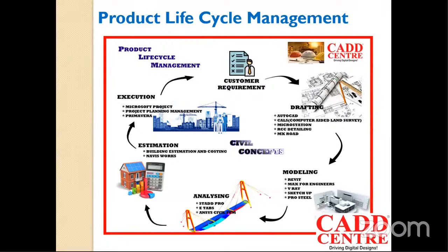Now the problem is in the profile of the duct. The plan fails and moves to the structural department. Again the plan fails in the duct profile and moves to the structural department. The structural engineers have to redesign something. Then it moves to the architectural department for approval, to check whether the aesthetics are okay or we have to redesign, etc. In those times, they wasted that much time in designing and in approvals.